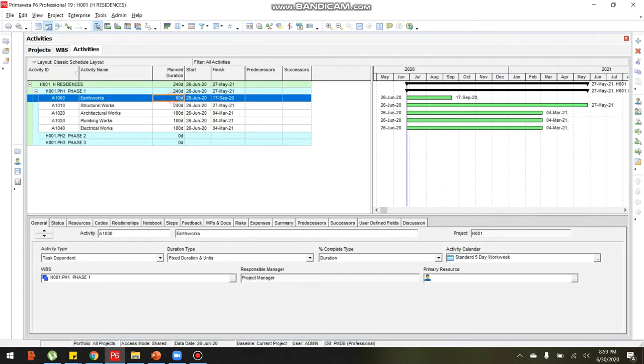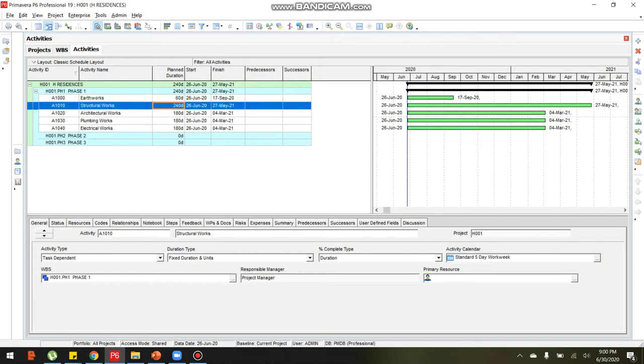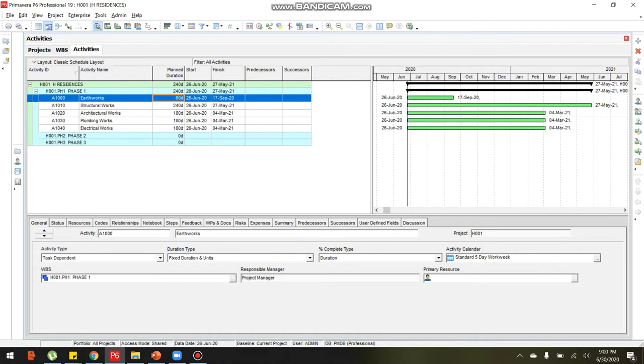As you can see, if we type a duration, a bar chart automatically appears on the left side, in the time scale, and the finish date for each activity is also automatic. This duration is for tutorial purposes. The actual plan duration can be computed based on the type of activity and the productivity rate you apply, which also depends on the resources that you assign. For the meantime, we will create simple activities for this project.